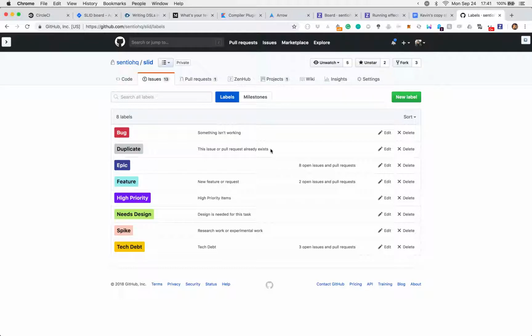So epic is for epics. If you're familiar with Jira at all, epics are these bigger buckets that don't really make sense to put in a sprint because they're too big for a sprint. They span multiple sprints. Epics will work hand in hand with milestones, but unlike a milestone, which is more around what you're going to deliver, an epic is more about the feature itself. So an epic would be like V2 design refresh. Anything that has to do with the V2 design refresh will be under that epic. It just helps you group things together to make things more clear.